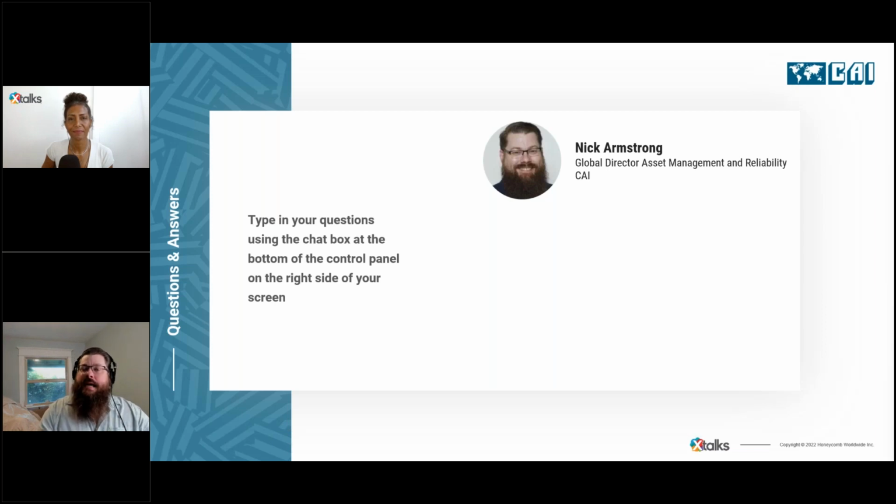incredibly important. And then the second piece is one of the things that we train our reliability engineers on: you are not allowed to walk into the room with a blank piece of paper. Okay, you are not allowed to walk into the room with a blank Excel sheet. The prep work needs to be done. You're actually putting the answers in and then having the cross-functional team validate your answers as you go through, and adding as you go, but never walk into the room with a blank piece of paper.